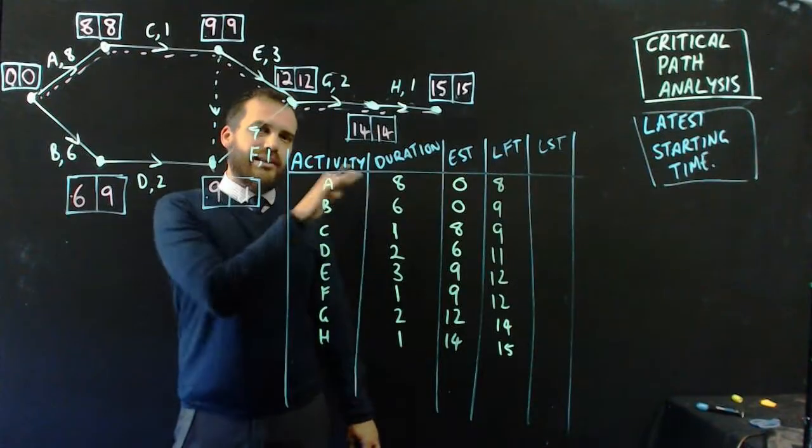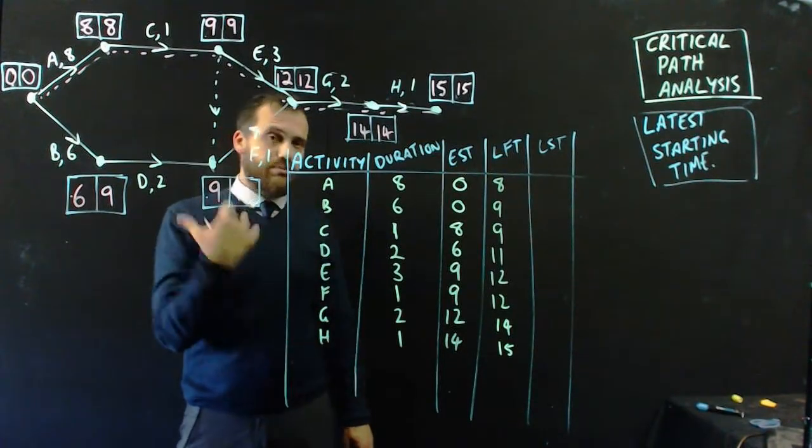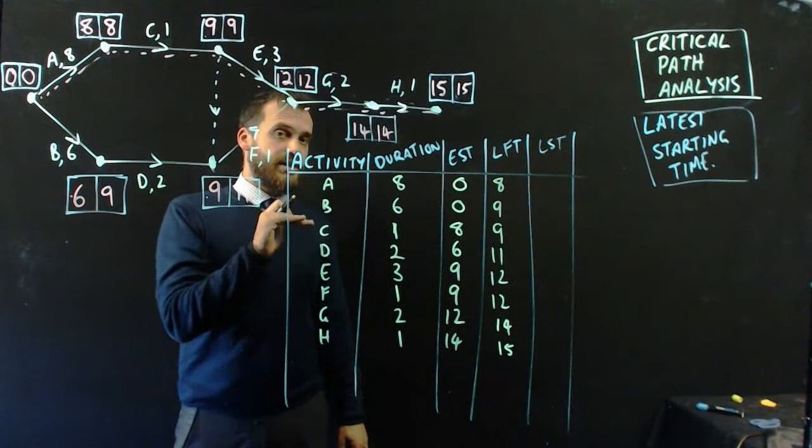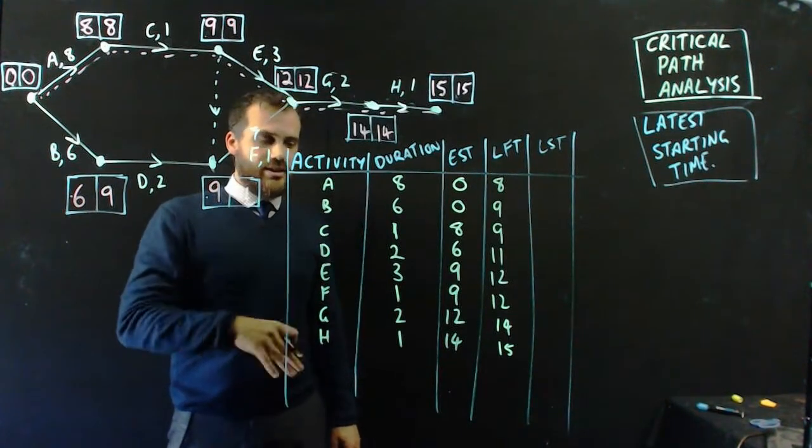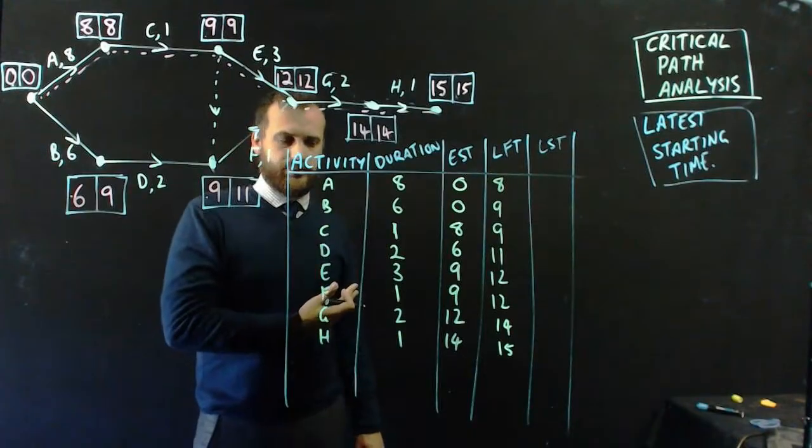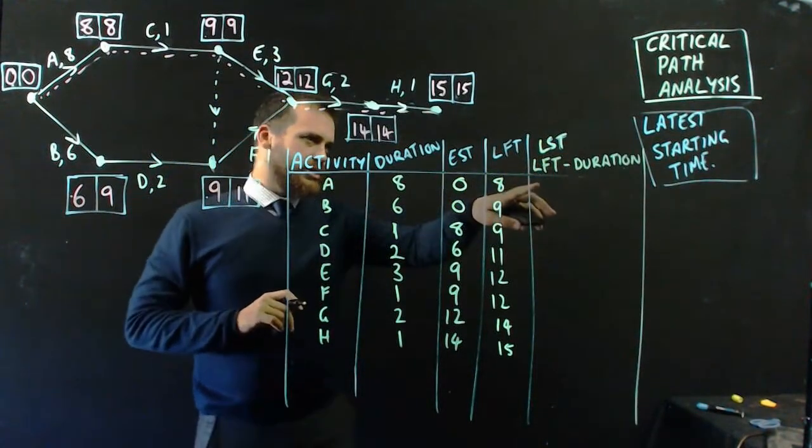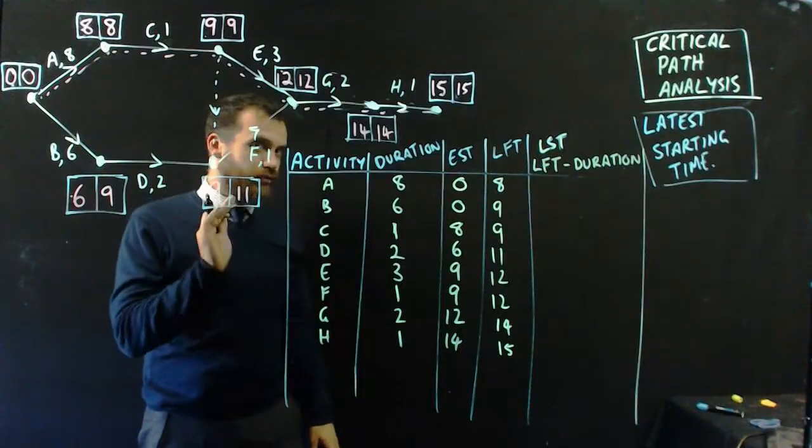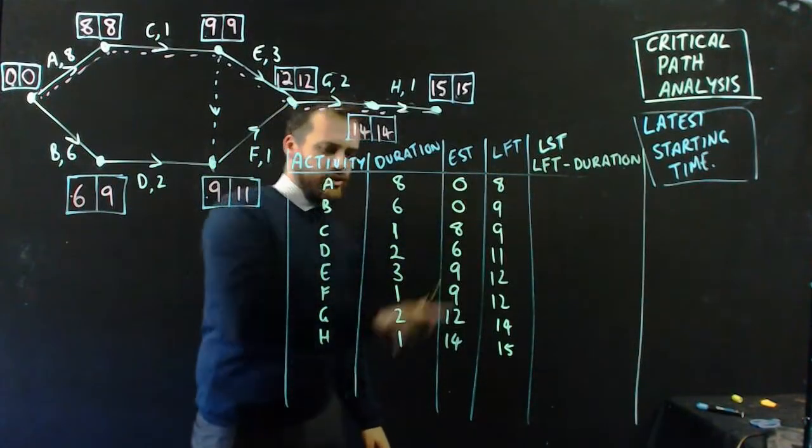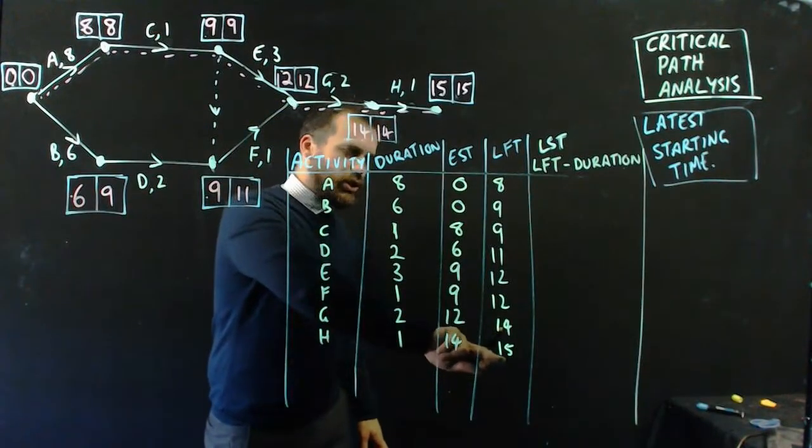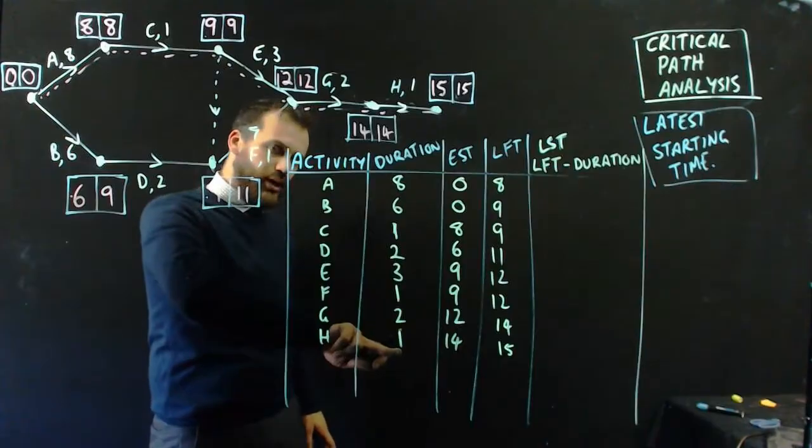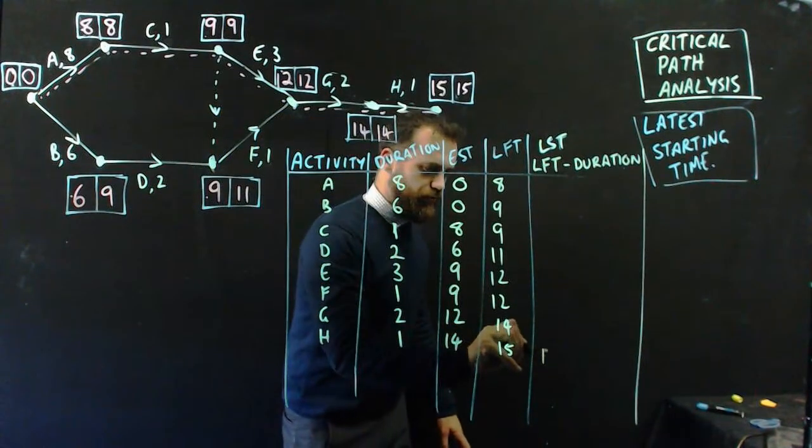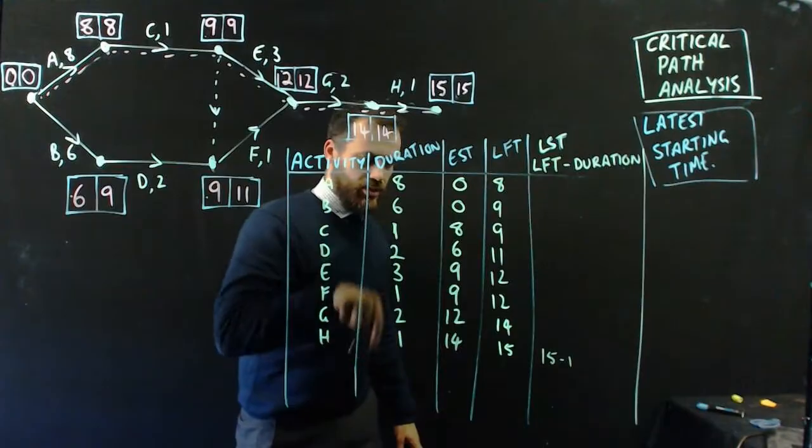And what about our last column here? Latest starting times. Latest starting times is the most important part of this whole critical path analysis, because we're saying, right, this is the latest that this job can get started. If it gets started any later than this, the job won't get done on time. Now, I've written in a little formula for you up here. The latest starting time is equal to the latest finishing time minus the duration of the activity. Now, that should make perfect sense, right? Because the latest finishing time of job H is 15. The time it takes to do H is 1 hour. So that means that the latest that H can start and have us finish on time is 15 minus 1, which is 14.